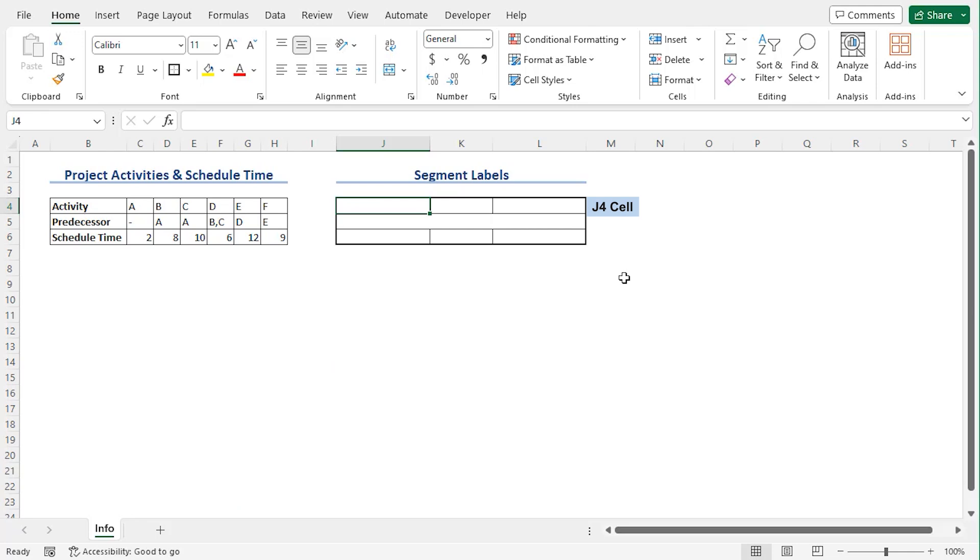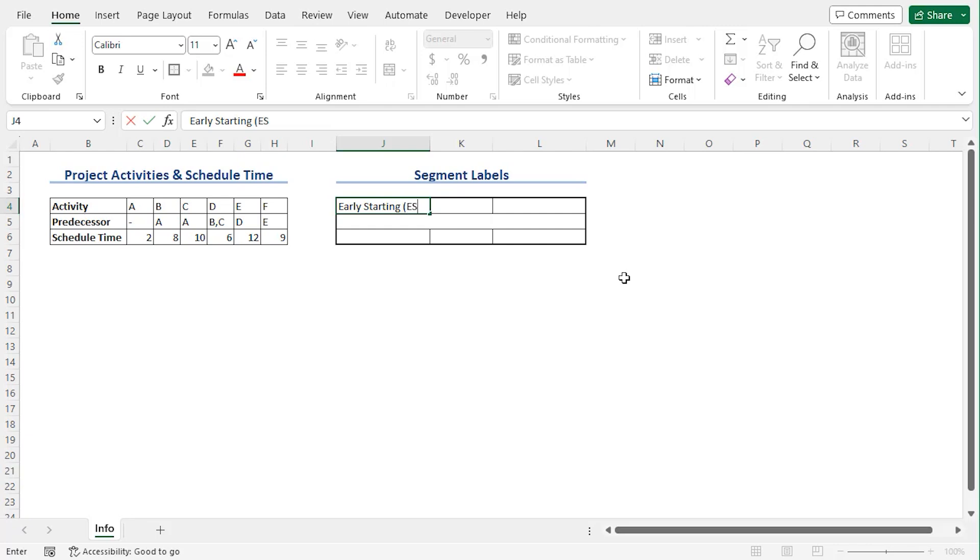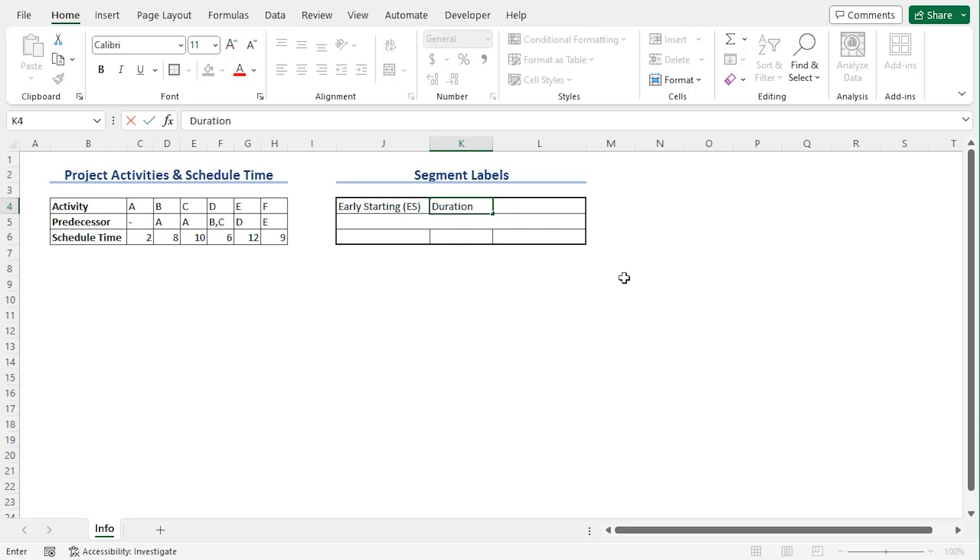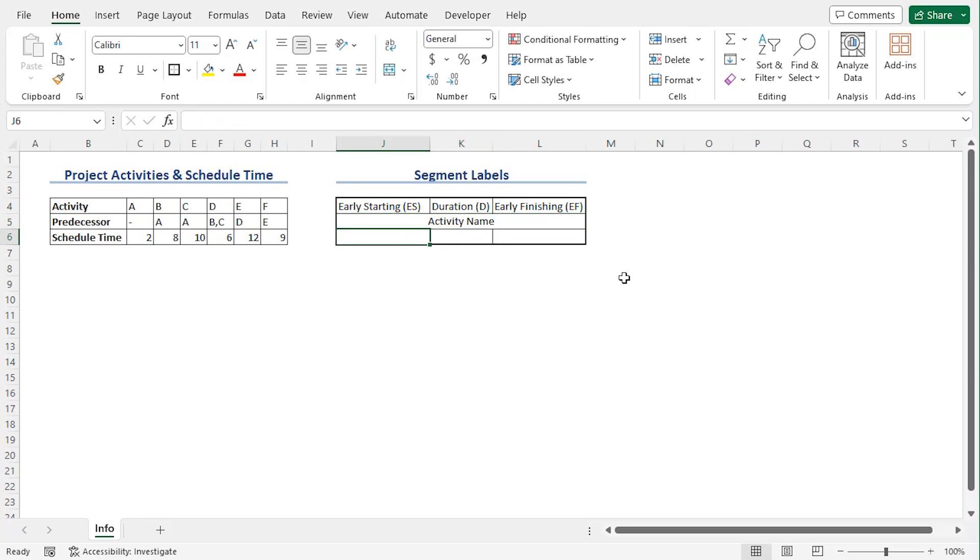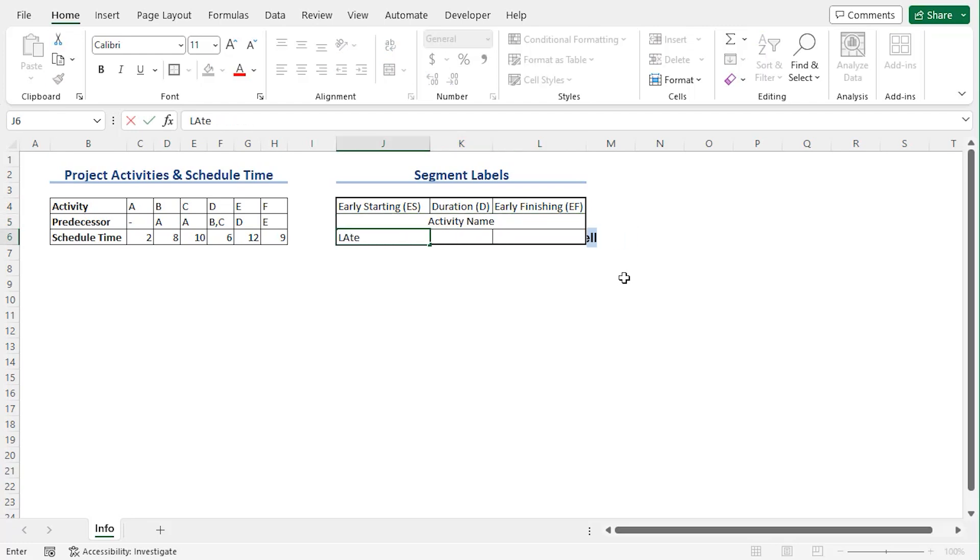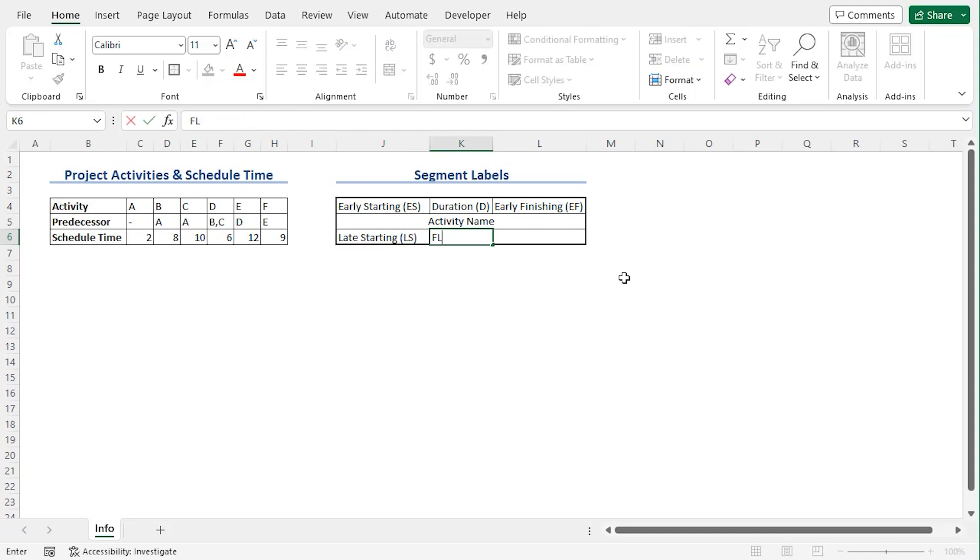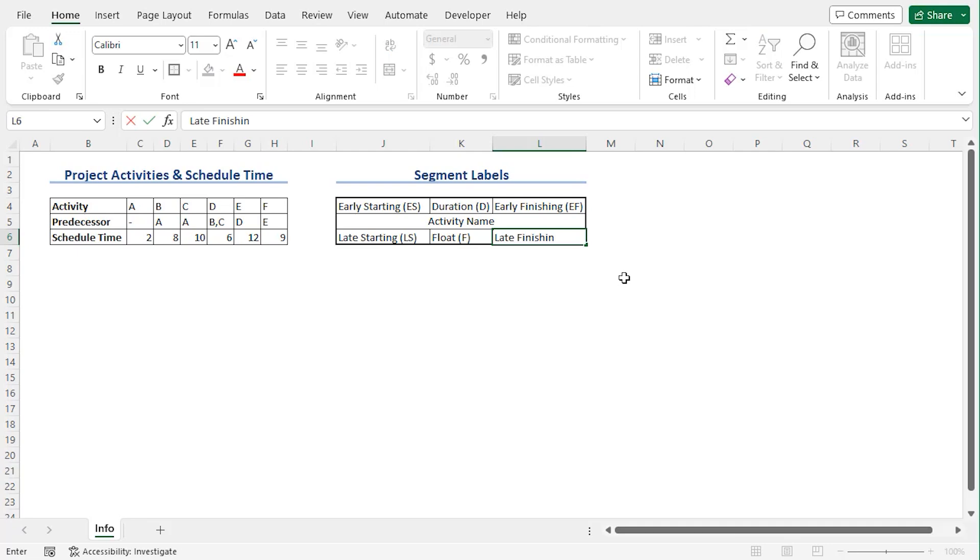In J4, let's add early starting that will be used as ES to record early starting date. Then duration as D, early finishing time EF, now activity name. Now in J6, there will be late starting or LS. Then float, F, as in what time was actually spent on the project, and finally late finishing or LF.